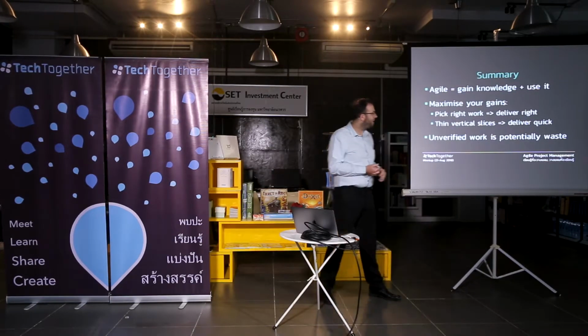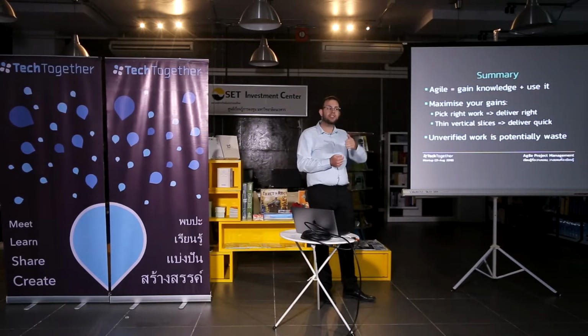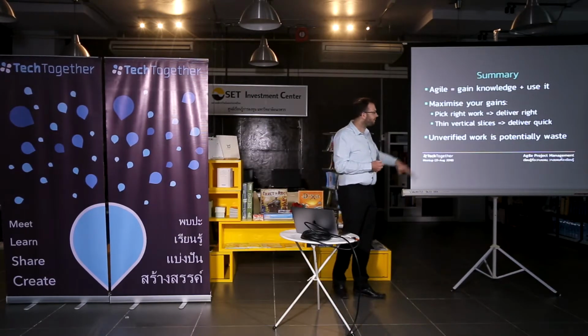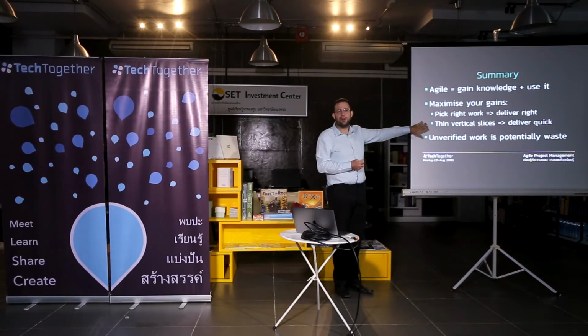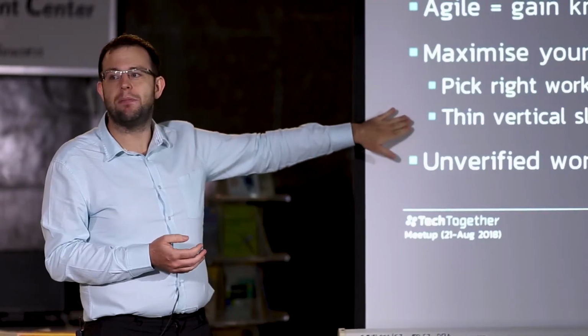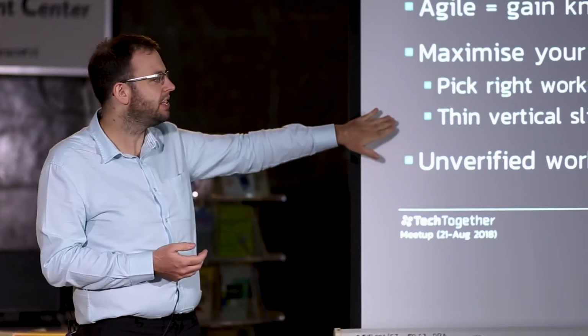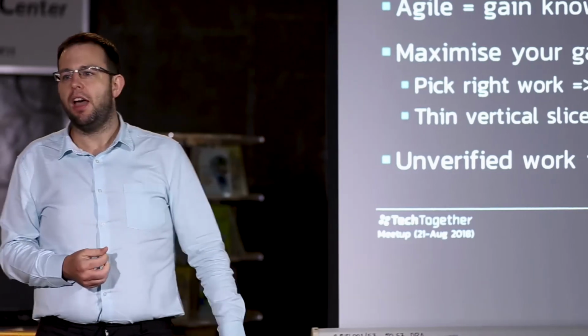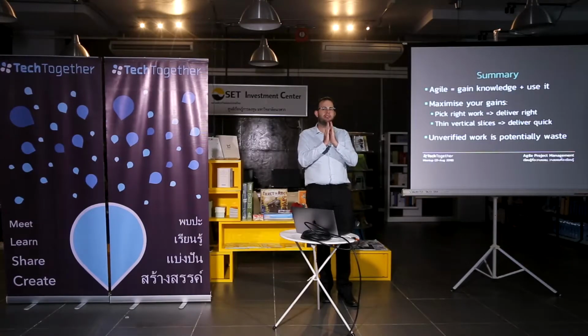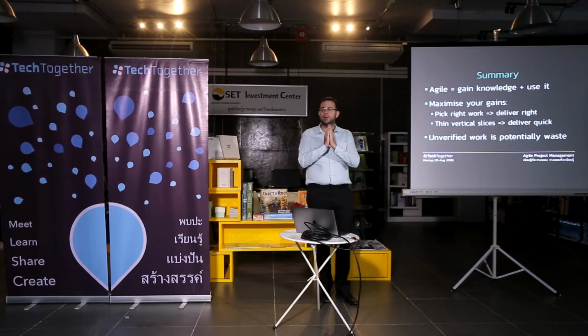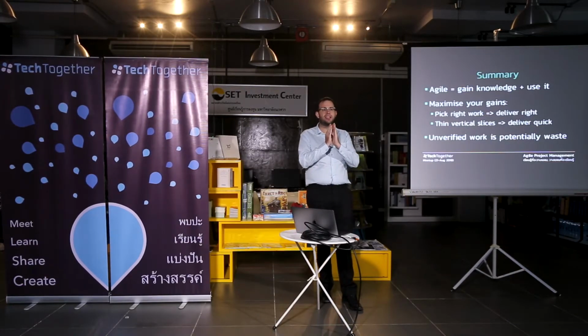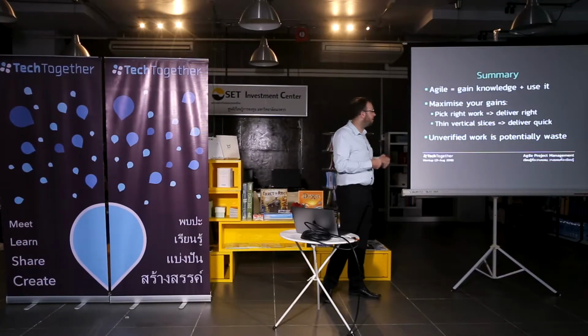And these were ideas how to do that. Maybe smaller tasks, deliver more often. Again, I don't know what you guys are familiar with, but fairly typical. You might be working on some task for 5 days, maybe more than 5 days. When I say deliver quickly, I really mean your tasks could be as short as a few hours, and I aim to have tasks less than 1 day. For me, if a task takes more than 1 day, I should be able to split it into more pieces and then deliver them independently.